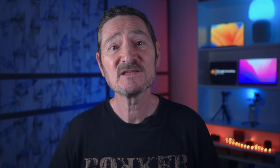You'll notice we have a to-do column on our sprint board. Just because we've taken something into sprint doesn't mean our cycle time has started — it only starts when we actually pick up a work item and actually start work on it. The to-do column is a queue which should be ordered in priority and we pick from it when we have capacity. The agile tool you're using, whether it's JIRA or Azure DevOps or whatever else, is tracking the time it takes a work item to get from state to state in the background — you just need to extract that data.